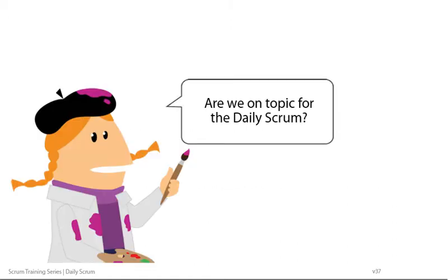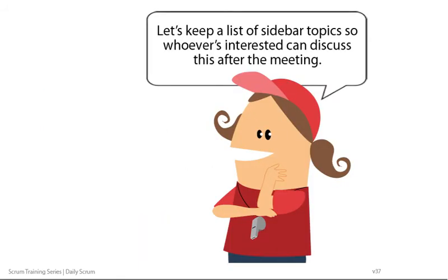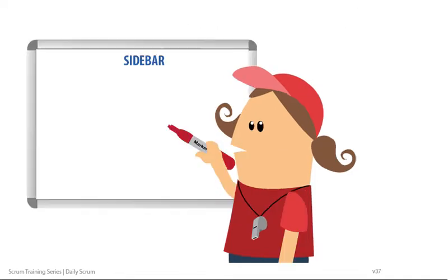Are we on topic for the daily Scrum? No, probably not. This should probably be a sidebar. Let's keep a list of sidebar topics so whoever's interested can discuss this after the meeting.